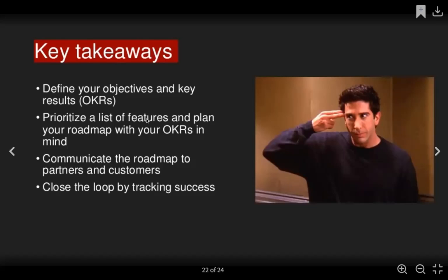That is for general, quick, dirty prioritization. After doing that, you can also go deeper to prioritize some more with something called the RICE framework. With the RICE framework, you're looking at things like how many people can you reach with this product that you are working on. What is the reach of the product? And then you're also looking at the impact. How many people would be impacted by that particular feature?